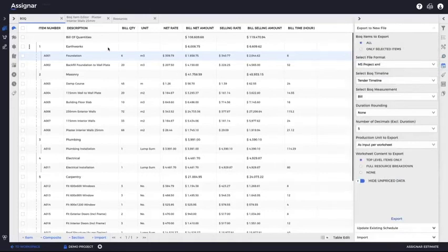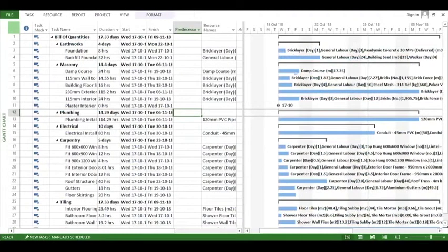And this will then automatically set up a list of activities for us. One activity is generated for each BOQ item with the correct duration, and they'll automatically be fully resource loaded for you. I've already done this, so I can just show you what this would look like. As you can see, I've got a Microsoft Project file here where we have activities for each BOQ item with the correct durations already populated. So this gives you a nice parity of information between your planners and your estimators. And your planner can then action all of this, with critical path planning and linking of activities, using any of his preferred tools of choice.